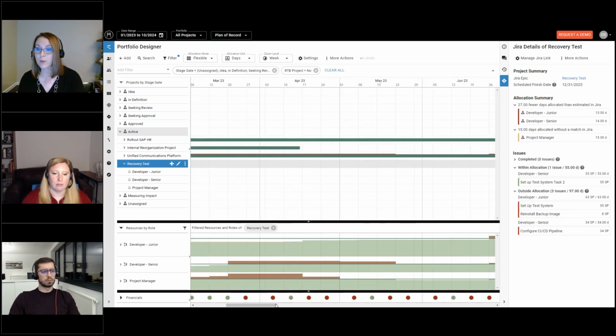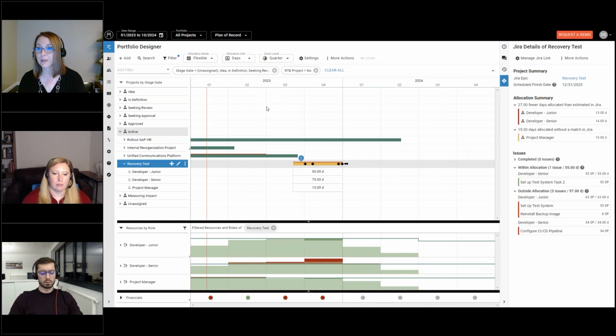It's easier if I look at a quarter level here. If we were to look at what was in the plan, one way of working with this integration is thinking months ahead of time: what does that work take? You give a high level estimation and you plug that in by role. Later, as they refine their work, they may find that it's a different estimate.